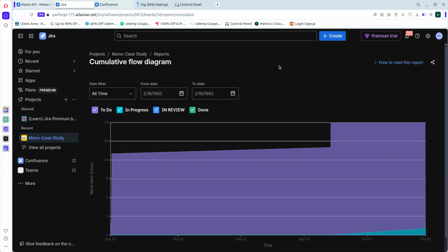And then the final reason why a BA needs this is a BA can use it to argue for process tweaks like better, clearer handoffs, trying to create more clarity. With the way things are going, maybe we would have to add a new function into the system, so that as soon as a task has been completed, that is, it moves from in progress to review, whoever moved that task from in progress to review should reassign the task to another person.